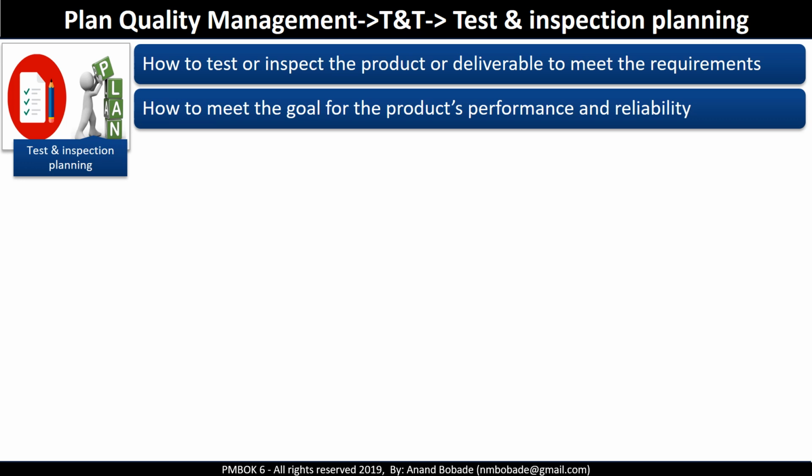One of the cost of conformance is the cost of appraisal of whether a defect exists in the product or not, namely the cost of testing or inspecting that product. The project team need to determine how to test or inspect the product as well as how often to do the test or inspection.